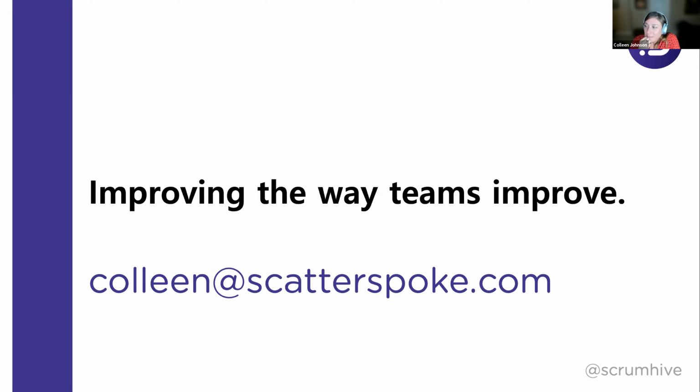I think probably the biggest retro I did had 60 people in it. We did it all in a room. What we did was have everybody bring their key themes and patterns from the last month, and we pulled everybody together, and then we did breakouts where each group took different themes and talked about possible improvements to make to those. We numbered everybody off and then numbered the areas of focus for conversation, and everybody broke up and went to different rooms, and then came back and talked through identified improvements. And then as a group, we voted on all of them.